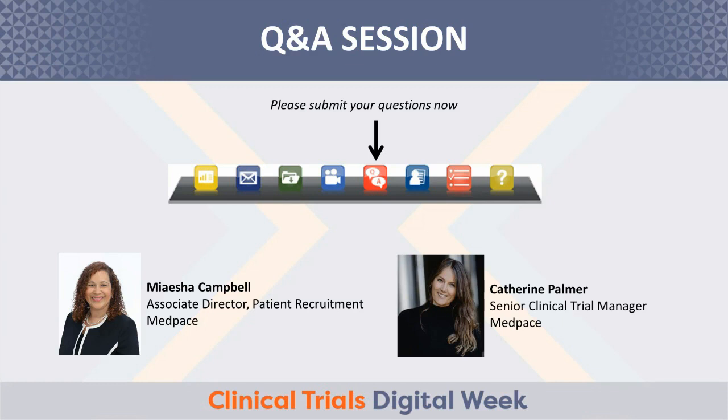I'll take that one. So Medpace conducts review of protocol drafts by its medical experts and then its CTMs, such as myself, and functional area leads to identify potential study design issues, included but not limited to whether the appropriate assessments have been employed to achieve the objectives of the study, and potential areas for protocol deviations, whether the project is feasible from a patient site perspective, and the potential burden to the site and patient, as well as potential